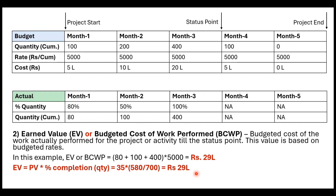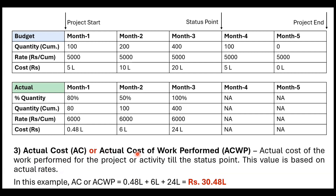Actual Cost (AC), also called Actual Cost of Work Performed (ACWP), uses actual quantities multiplied by actual rates. The budgeted rate was ₹5,000 per cubic meter but the vendor was actually paid ₹6,000. So: 580 cubic meters × ₹6,000 = or alternatively summing monthly actual costs — ₹0.48 lakh + ₹6 lakh + ₹24 lakh — gives an actual cost of ₹30.48 lakh. Actual cost has nothing to do with budgeted cost; you simply add whatever you incurred each month.